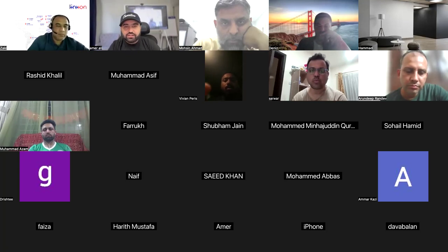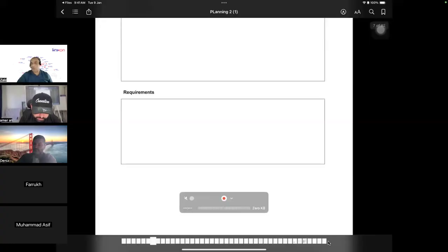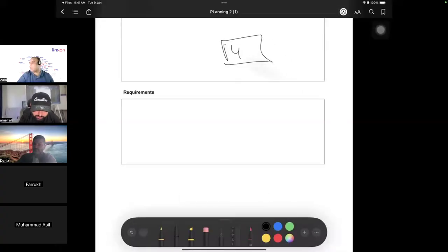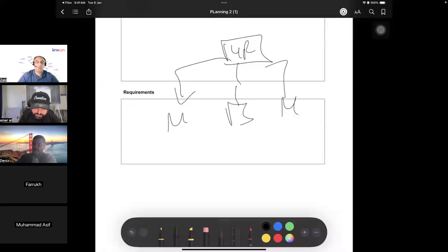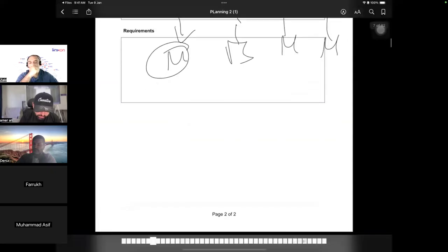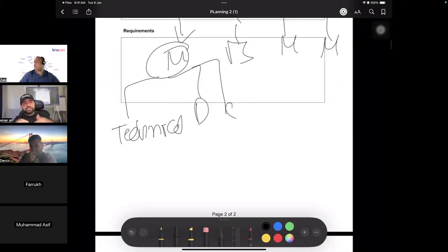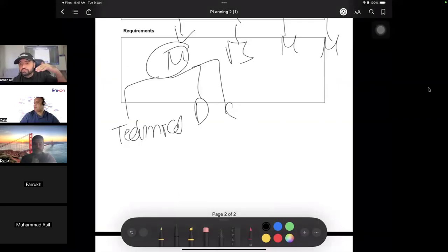Okay. So RBS, resource breakdown structure. What types of resources do you have? When we talk about RBS, resource breakdown structure, there are types of resources: manpower, human, machinery, money, material. Human, which type of resources do we have? Technical resources, those drivers maybe, those kitchen staff. So resource breakdown structure is basically moving down, just like WBS moving down.